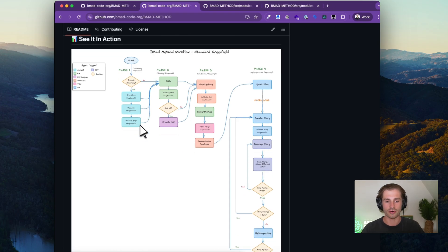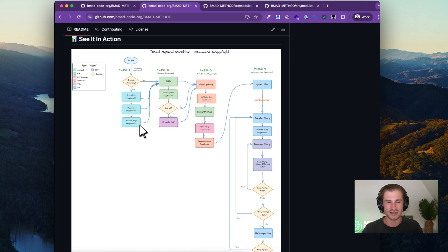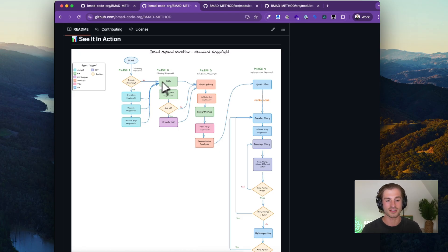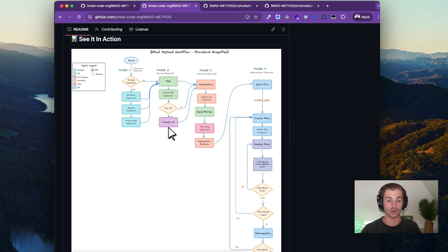The four-phase approach starts with phase one: discovery — brainstorming, competitor research, and the product brief. The product brief is essentially a less technical document focused on the business use case — the idea or problem you're trying to solve. Phase two is building a PRD, or product requirements document. This is a more structured scope document for exactly what you're looking to build, slightly more technical, and it also includes brainstorming user experience guidelines with the UX designer.